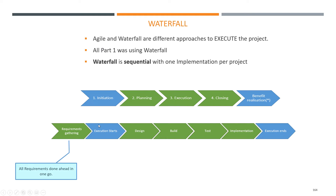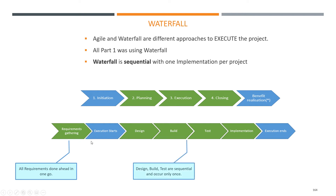For Waterfall, during planning, we ask the business to provide us all the requirements. We say: what do you want exactly? Write this big document, put all your requirements in there, you sign them off, and you hand them to us. And then we go into Execution, and we design based on this big document, we build based on this large document, and we test based on this large document.